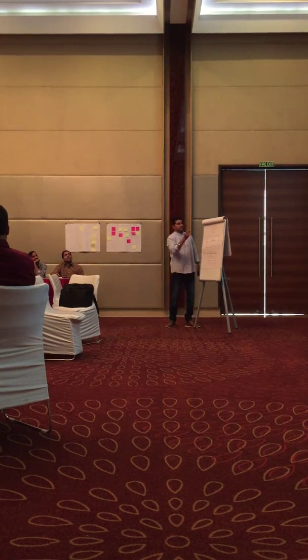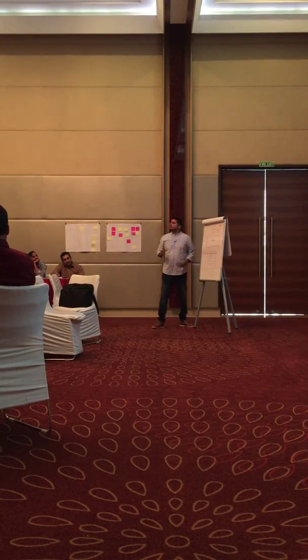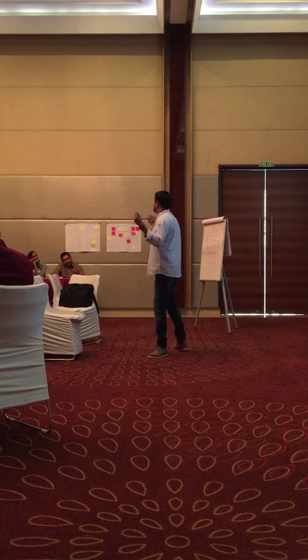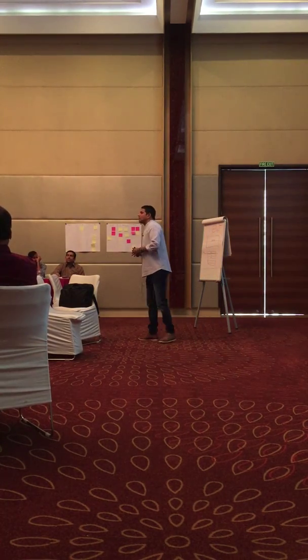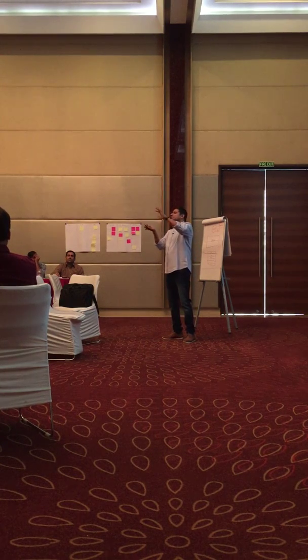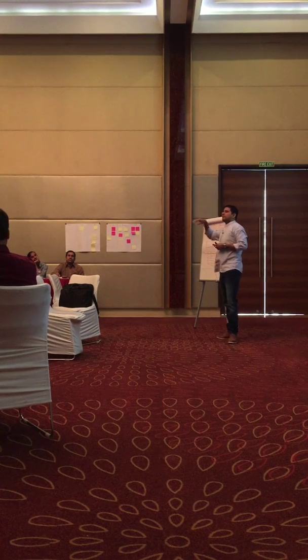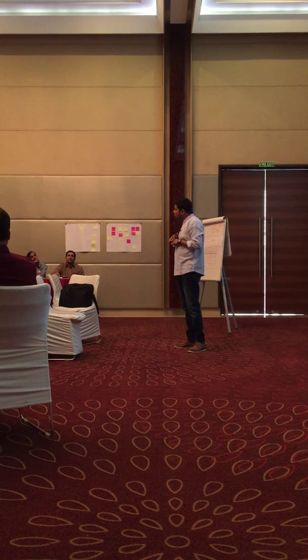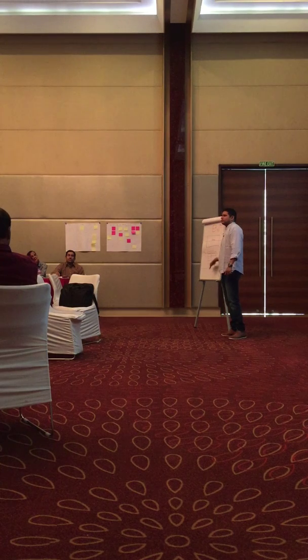That means, take an example, registration, which has 45 fields. Now the development team says, no, it takes a long time, it cannot be done in one sprint, so we will split. Then the product owner or one of the team members who joined recently comes back: okay, first sprint, we develop all the user interface related requirements of this registration. In the second sprint, we build the business logic. Third sprint, we build the database layer. Is it good? Which is nothing but this concept, horizontal splitting.